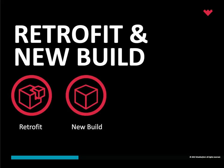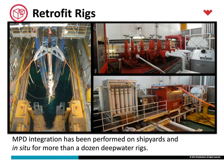The retrofits done historically have been flat — we haven't spent a lot of time building structures because we're managed pressure drilling service providers, not structural engineers. But there is opportunity to stack equipment, build frames, and strengthen decks to minimize deck space. Each project we look at now, we are trying to go more vertical than horizontal so that we're not taking up all available deck space in the Christmas tree area or on the main deck. The equipment is more hidden, more out of the way, and not constantly in conflict with other rig activities when MPD is not in use.